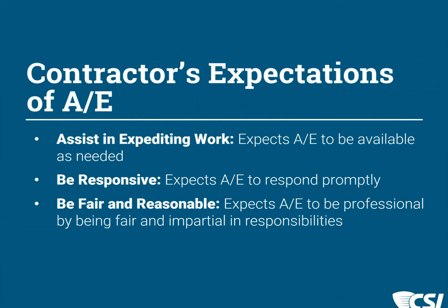Additionally, Ron wants to give a reminder that the contractor's AIA affidavits regarding payments and claims, if not accompanied by waivers of lien by the subs, are a useless sworn statement, because the standard AIA doc language indicates the contractor swearing is limited to the attached waivers. Those contractor affidavits are regularly submitted without any sub waivers, which is useless. I agree with that, and we often require waivers downwind from the general contractor, particularly the primary subs, and absolutely when there are copious amounts of stored materials. So that's a great point.